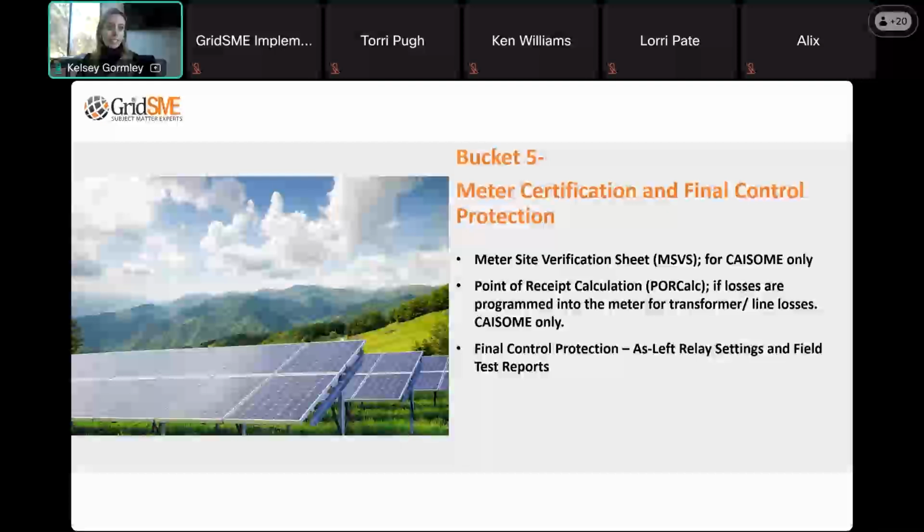on this project anymore. So what we always recommend is, because there's no validation on that role in this form, it should be somebody who's still close to the project and who's still part of the project, whether that's the site foreman, somebody who's still there working on the site from the EPC's perspective, the site project manager, somebody who's going to be paying attention and looking for this. So that's a big one.